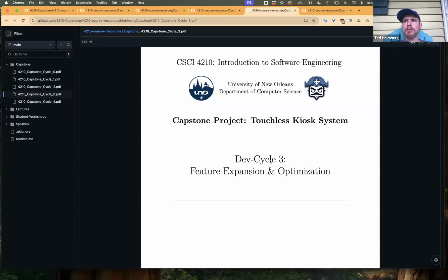And once we have the core systems built out, we can reliably build on top of those to have the deep sets of features we might need. We've identified these features as high priority, medium priority, or low priority, and we would prioritize implementing the high priorities at any time. Then we can have very agile sets of cycles. As we keep integrating features into our build, various pods at different times can take in their stakeholders whenever necessary, get their feedback, and keep updating that way.